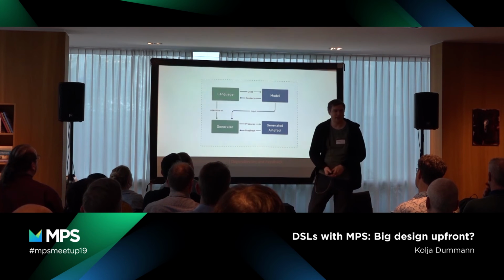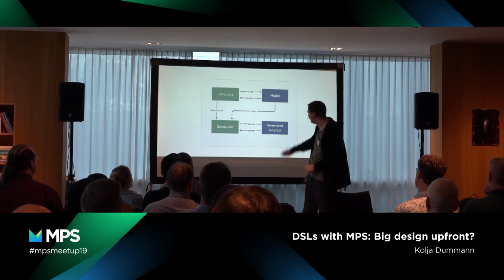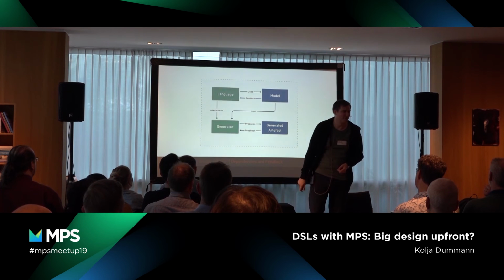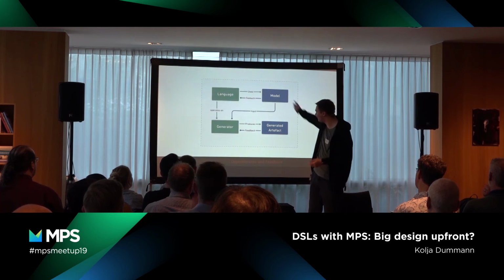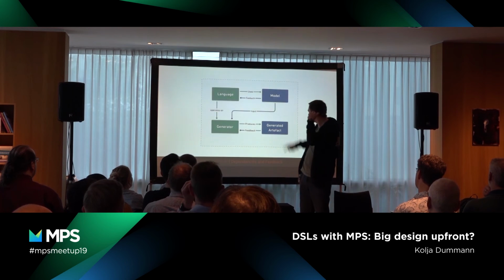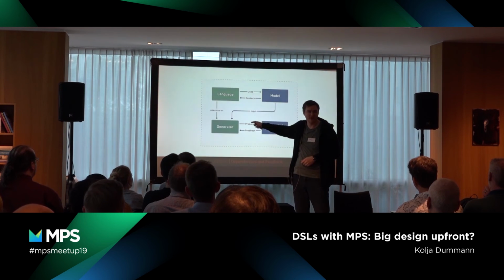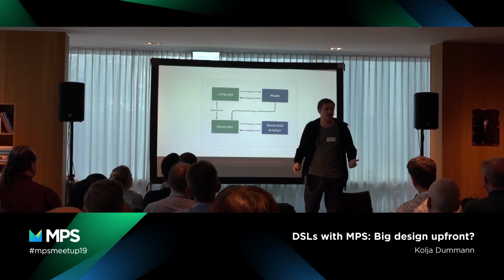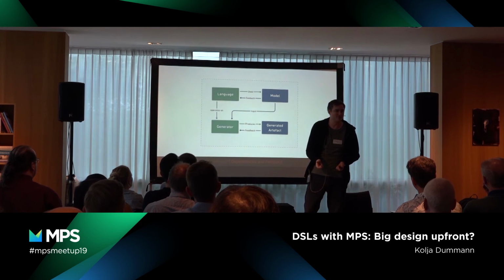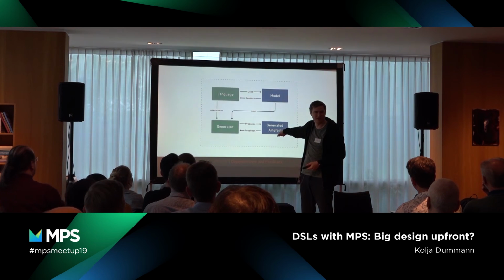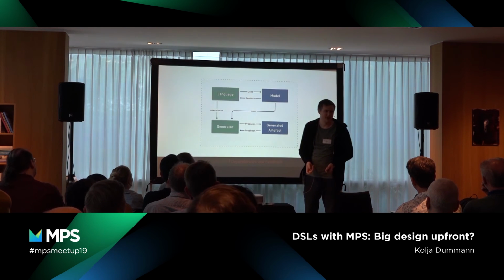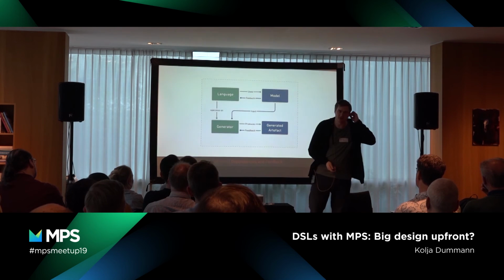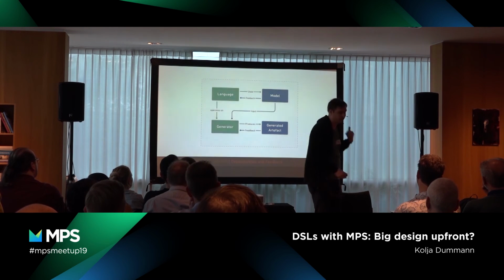And in one of the projects, we accidentally ended up with this. And the team who was using the model and was also owning the generated code was utterly frustrated. And we didn't actually understand why until we looked at this. Because we saw, okay, if they change the model and the language doesn't allow them something, they have to talk to the language developers. And one iteration later, they actually notice, oh, the generated result is not what we want to have, but we are still responsible for running the generated artifact. And we don't also own the generator. So they basically always had to wait a lot on the people who built the language and the generator. So this is really something to avoid if you can.